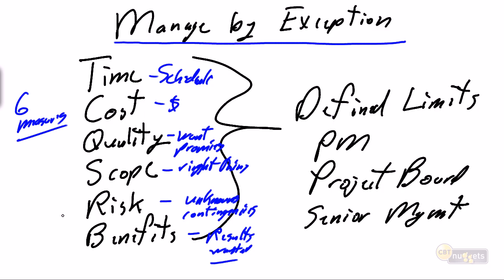The key component of Prince2 is that we manage this within defined limits. And we have different limits for the project manager. So within time, the project manager has 100% the authority and the responsibility to manage the project as long as the time, the schedule is within, I'm going to say 10%, or plus or minus 2 weeks, where I'm just trying to quantify what the 10% is.